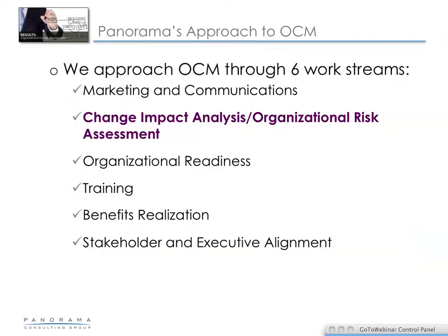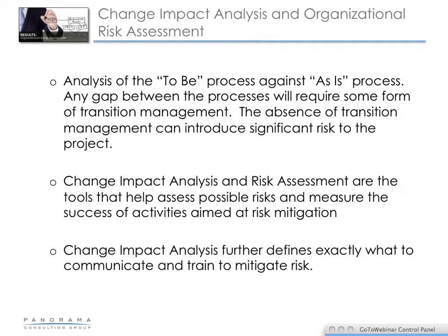Okay. Our next work stream, change impact analysis, organizational risk assessment. Change impact analysis is where we take a look at the to-be process. We bump it up against our as-is process. Those gaps that are identified are going to require some form of transition management.